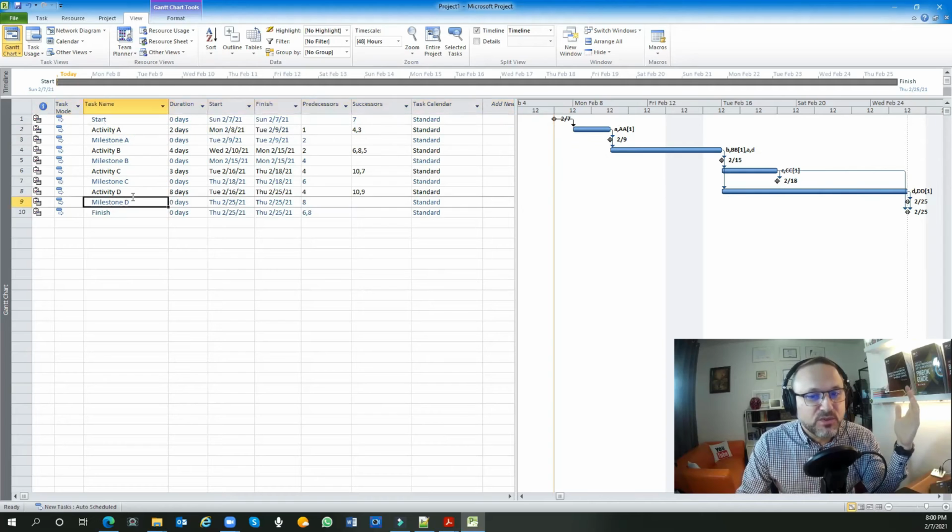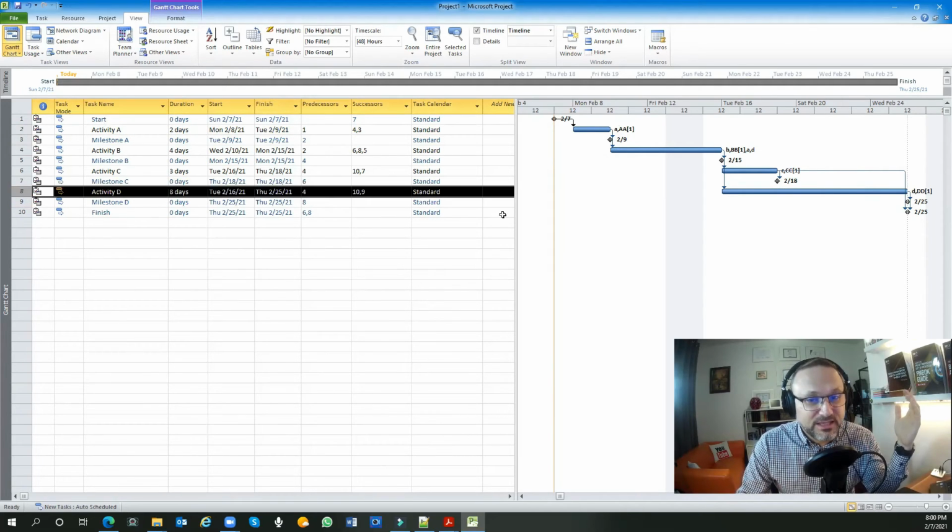Before, I will start with preparing activity D material to be ready on site. If I have activity D ready on site, I cannot start either with activity A, then the activity D material is just staying on site and somewhere in the warehouse without use. So you need to prepare yourself.